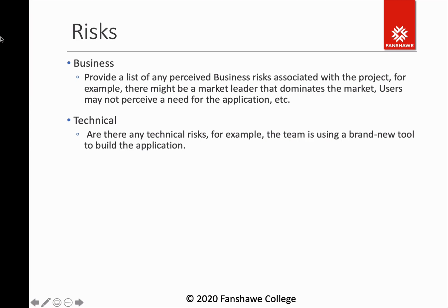And I've been on a lot of projects where that happens. So when we think of risks, one, we want to identify them. And secondly, we want to build a strategy to either avoid, mitigate, or deal with the risk in some way.